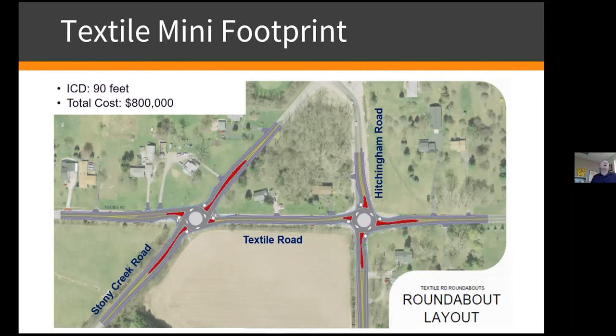It cost me $2.5 million, as they try to explain to me, to design-build a traditional size roundabout. We can't get anywhere near 400,000. And my explanation to them is, you're probably right. Our markets are different. Your labor's higher and your materials probably are harder to get. Point is this, if you build something smaller, you may not be able to get 400,000 in those dollars, but you might be able to get it down to 1.5 million.